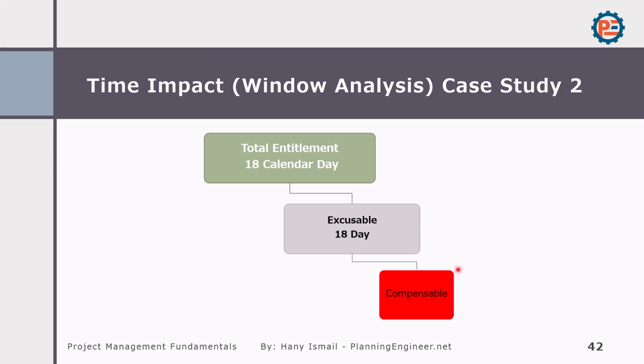If I have a project manager, I assigned him for 1 year in the project. I'm going to pay him salary for 1 year. Now I have to pay him salary for 1 year and 1 month because of the new scope of work which affected my original scope of work. So this is the case.